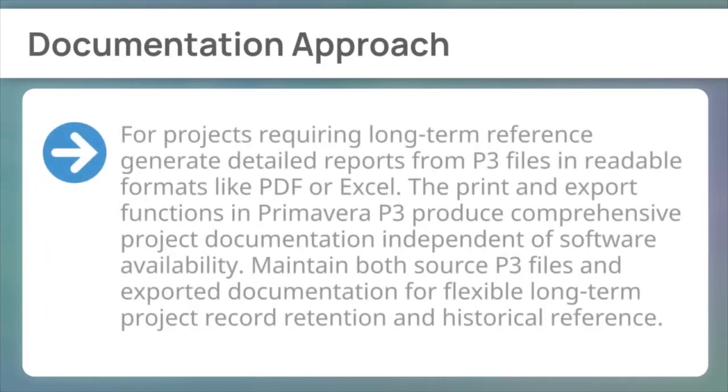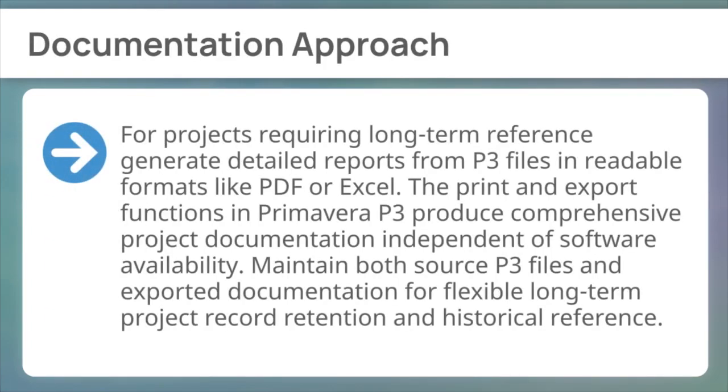Finally, documentation approach. For projects requiring long-term reference, generate detailed reports from P3 files in readable formats like PDF or Excel. The print and export functions in Primavera P3 produce comprehensive project documentation, independent of software availability. Maintain both source P3 files and exported documentation for flexible long-term project record retention and historical reference.